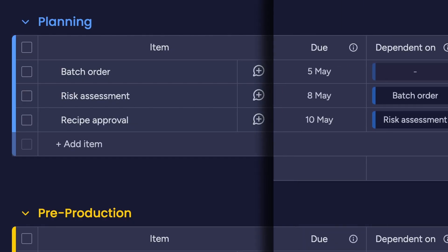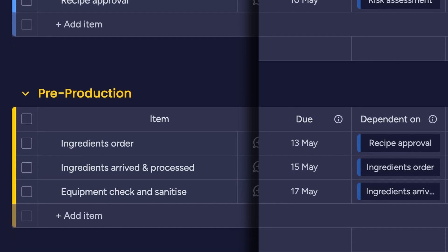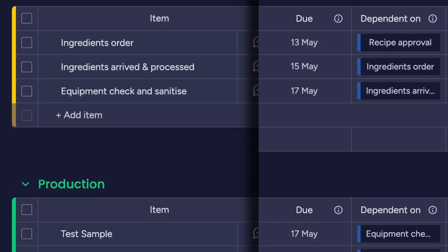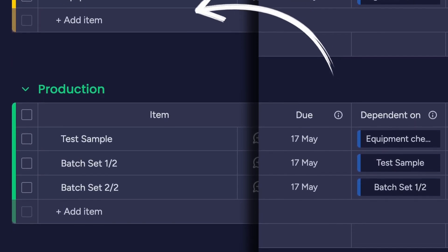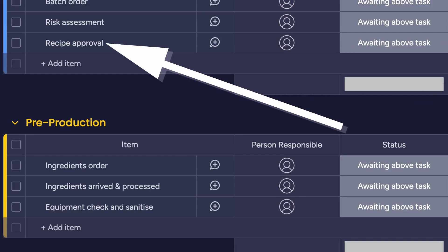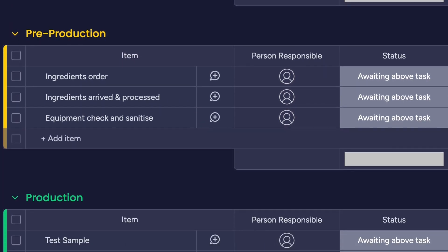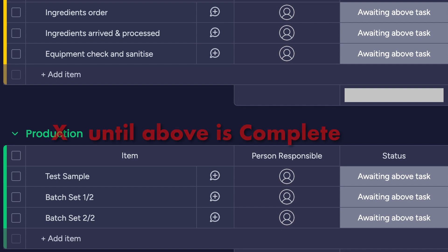After all, if you're bottling a fizzy drink, you wouldn't start adding the bottle tops before you filled it. With the dependency column, you can set up some dependencies to manage dates. In this instance, you need to ensure certain prerequisites are complete before you start the manufacturing process. You would finalize the recipe of the batch you are making before ordering the ingredient stock. Approval is needed before getting the ingredients, and the manufacturing process itself can't start without them, or without completing a health and safety check of the equipment.